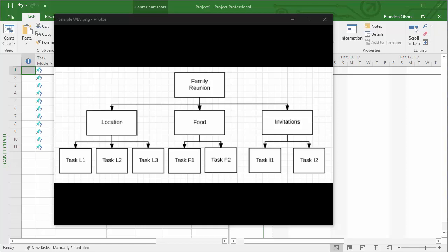We often see work breakdown structures depicted in this visual format as a hierarchy where the project is across the top, the different functions or portions of the project are underneath, and then the individual activities or tasks listed below that.